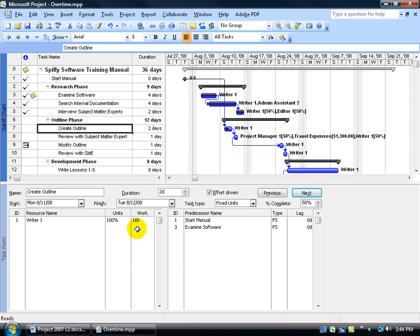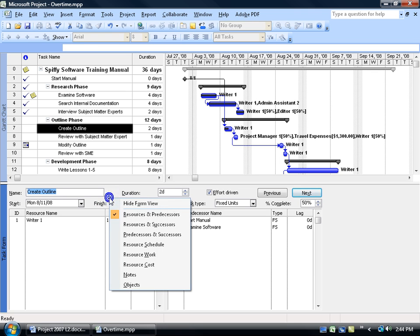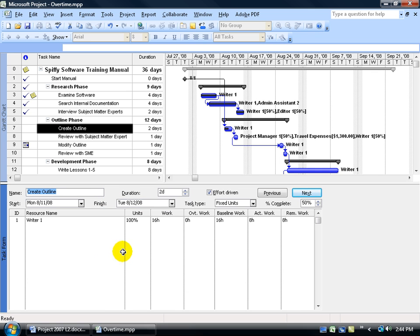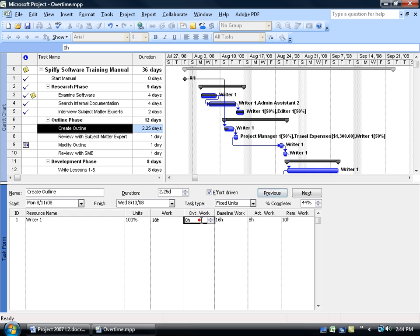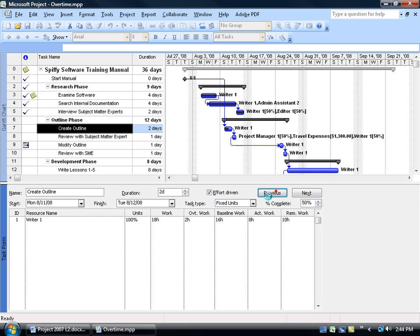Where do I go to enter in the overtime? If you right click in a blank area down below in the split window pane, you can come down here and select resource work. It opens it up to show you the overtime work column. I can come over here, increase the work by 2, click OK. Now you can see the duration is 2 and a quarter days. Come down here and give the overtime work of 2 hours, click OK. The duration is cut back because now he's working 2 extra hours on one of those days.